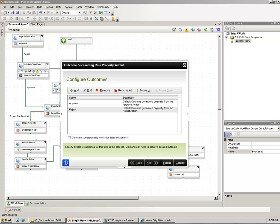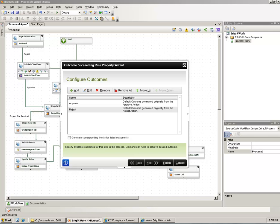In the case of a lot of companies where they actually have some type of a project management board that ends up meeting and voting on projects and prioritizing them based on cost and benefit, I can end up setting outcomes for each one of those so that if my board requires a three of five type of approval to move on, I can say as soon as the third person approves this, it's considered approved, or I can wait until all five do it. And I can set up different rules like that to make it very dynamic in nature.